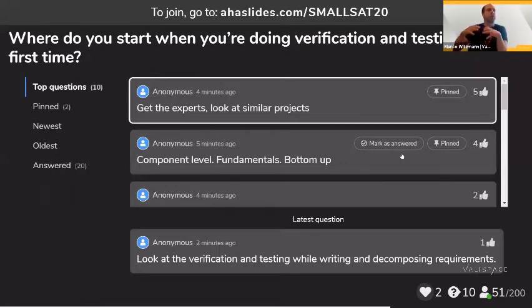If you start building up your plan like this, it sounds super straightforward. It actually is not, right? The question is, where do you verify these things? Sometimes you can do a lot of testing in the beginning and then you don't have time for system tests. Otherwise, you do system tests, you have no idea why something failed, and you have to go all the way back. So it's not as straightforward.